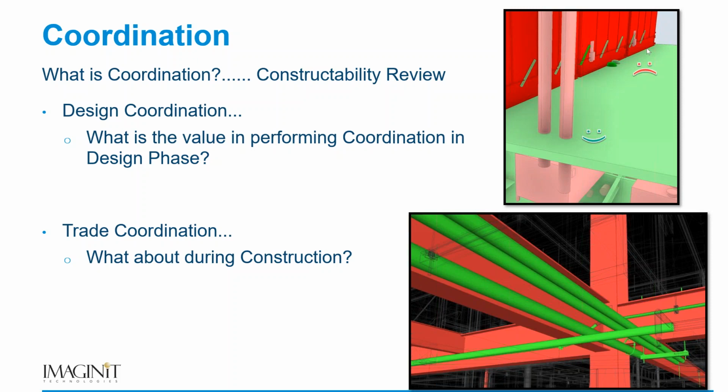Then we'll see some additional detail about how those affect the coordination effort and the design. But in construction, there are things that are not even considered during design, such as insulation or clearance zones. Design teams are not as worried about those. They're more focused on sizing and making sure the building works and will fit overall, more of a theoretical view, whereas in construction, again, we need to be constructible. It has to fit. And that's why we do this in a virtual manner.